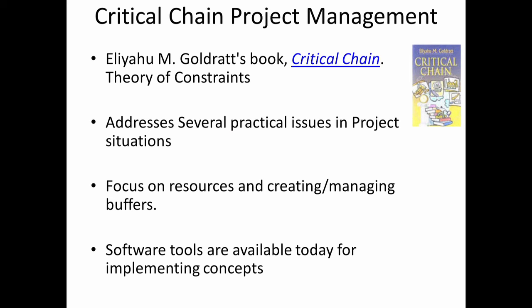Critical chain project management has been a very current topic. Many large corporations say they have moved from CPM-based planning to CCPM-based planning because it is more practical and gives better results. This was initiated by Elihu Goldratt, whose book called Critical Chain has been a best seller. He writes books that are very easy to read and convey management concepts systematically. His main focus is on resources — how to manage resources and create different buffers around resources so that the critical attainments of projects get delivered. Software tools to implement CCPM are also available in the market today.